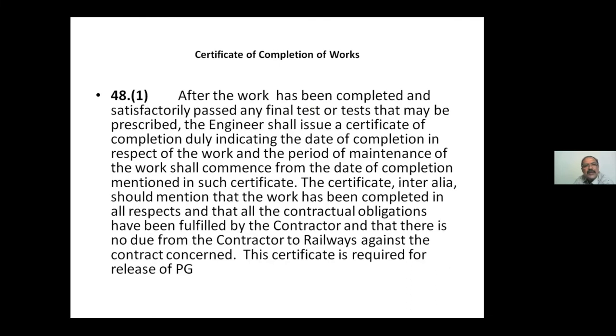A completion certificate has to be given as per 48-1 after work is completed in all respects and security deposit, everything is released. Then finally, work completion certificate has to be given under 48-1 of GCC. So this is very, very important.